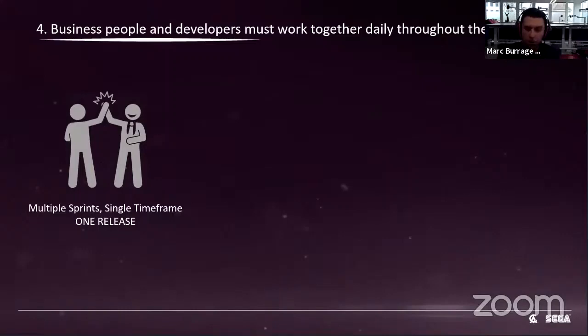Now that meant there was a lot of coordination that needed to go on, but it meant that everybody was really clear that this patch happens every two weeks. It's not a case of, oh, there's a feature patch going out then, there might be a content patch going out then. There was just this continuity of, we have to make sure that we're pulling this all together in one place. And it just made a really clear plan and mindset for everyone that every other Thursday was this really key point that we had to get things ready for.